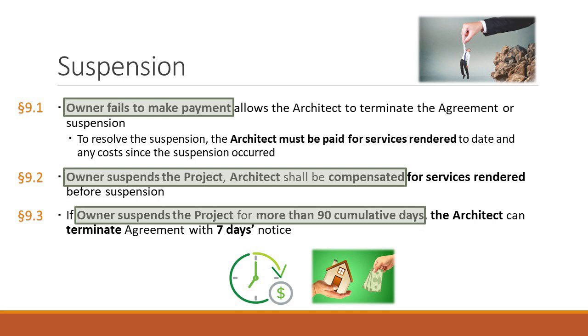So if you're off for like a month, and you had to adjust your architects working on the project, and then they had to get back up to speed, there's costs for that that weren't in the original contract. If the owner has failed to pay, and it's the owner's fault, the owner has to pay both the catch-up money and additional costs for the architect to get up to speed. Also, the schedule, and when the architect has to deliver things, have to be adjusted. So if we're down for a month, everything gets pushed out a month. So, while again intuitive and makes sense, you want to put it in writing in the contract to make sure that's the process when you bring everybody back up to speed.